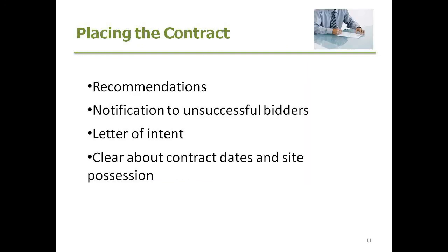Okay, after the tender analysis and evaluation, it's now time to make a recommendation to the client based on that analysis, and at the same time, be clear with all the other tenderers, notify them that they were unsuccessful in this particular instance, and also thank them for being a part of the tender process, because it's important that they've put in a fair amount of time and effort to obviously help them with future potential work, but that's also helping you along as well.